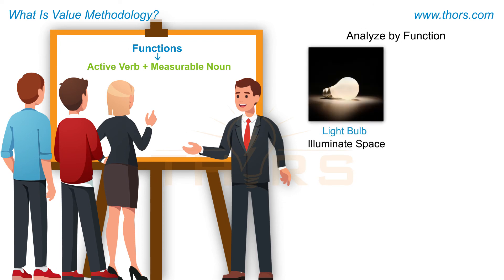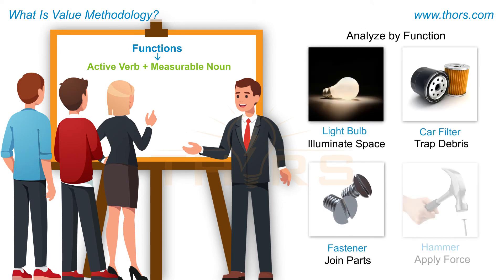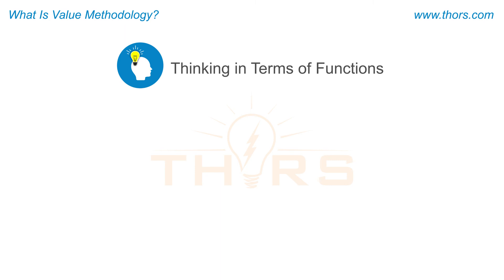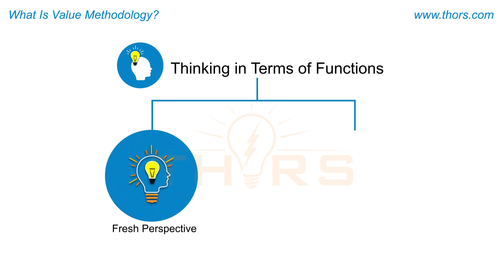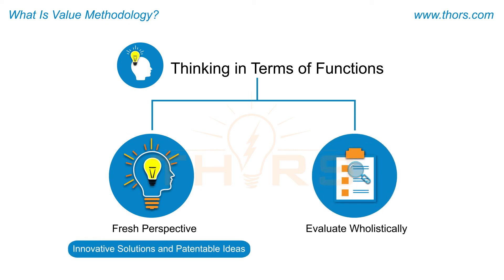Illuminate space, trap debris, join parts, and apply force are examples of functions. Analyzing projects in terms of their functions is the most unique feature of the Value Methodology process. The advantages of thinking in terms of functions include viewing the project with a fresh perspective and evaluating the project holistically. Fresh perspectives may spur innovative solutions and patentable ideas.